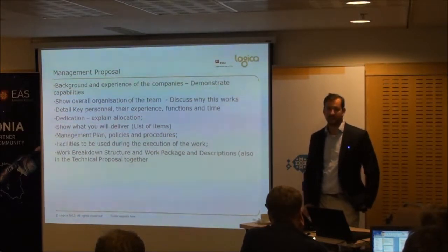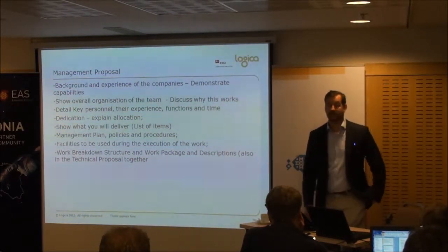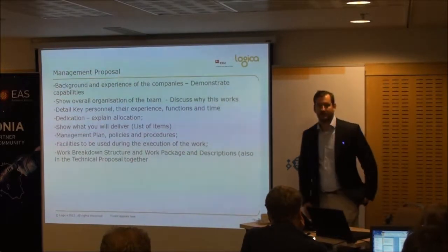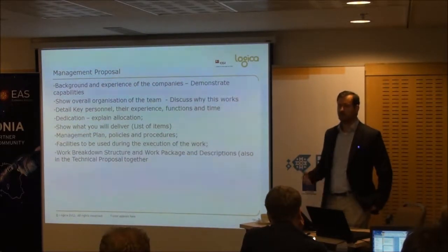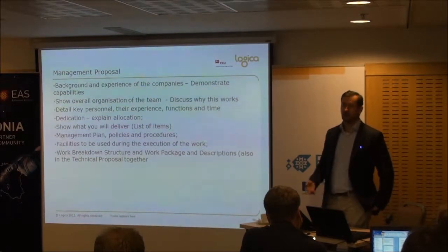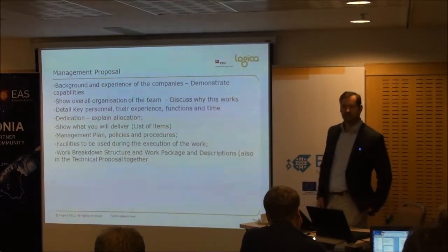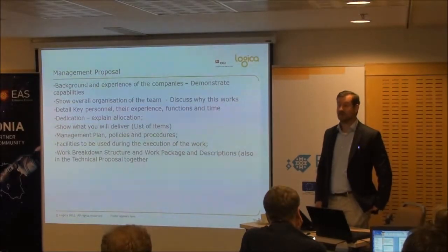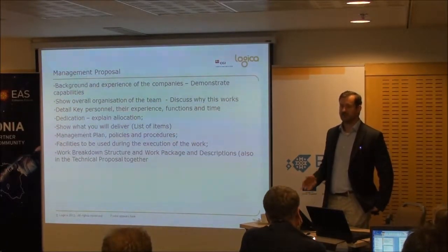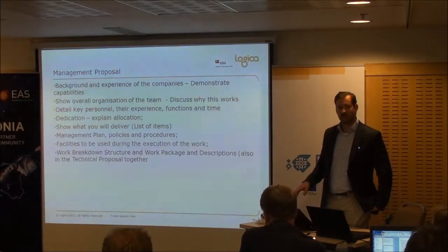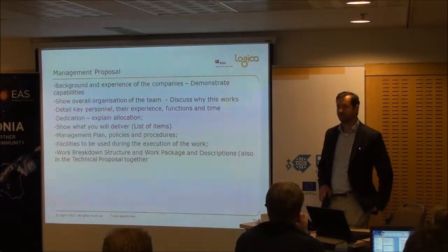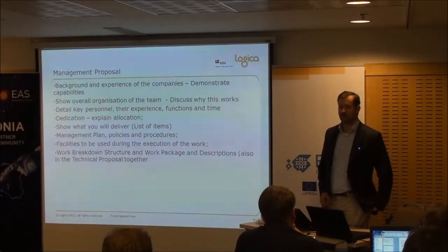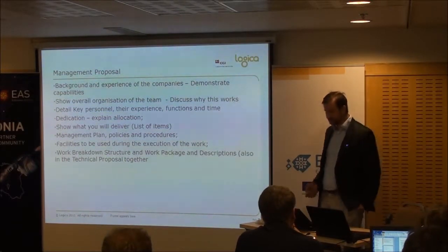Dedication. One of the things ESA likes to know is how much time am I going to get from this guy? They typically tend to like a high level of allocation. If you've got one guy working 10% or 5 guys working 10%, it's just unlikely to work in practice. For a small study, they tend to favour small teams, high level of dedication. Maybe with some expert advice coming into that.